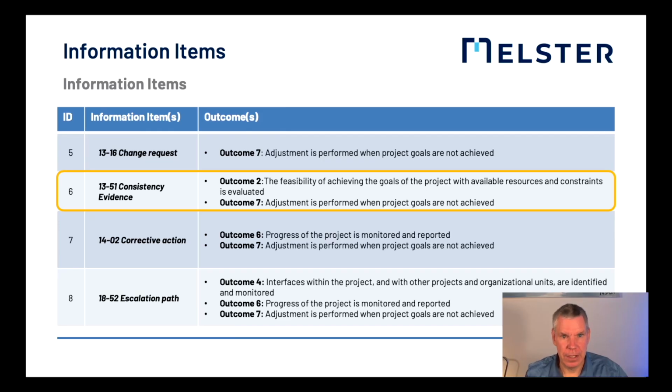First, after the feasibility and evaluation and initial planning, the consistency will be checked and established, which leads to this information item, consistency evidence. The second situation where a consistency check is needed is after a change in the scope of the project or after replanning in general.